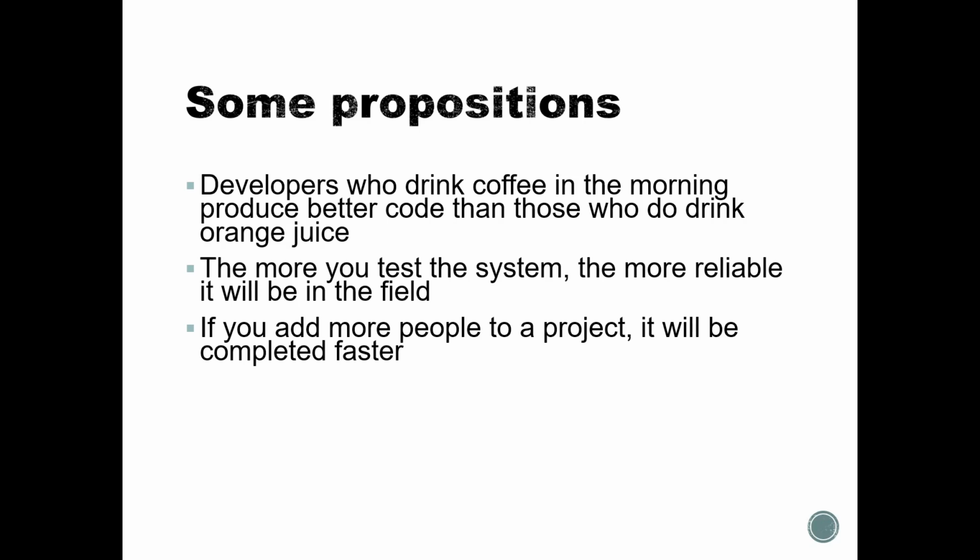Unfortunately, it will not always work. There's a rough estimate saying that you can halve the project time by throwing resources at the project, but you can't complete it any faster than half of the time, which is a sensible estimate. Meaning that if you have a 3-month project for one person, you can't throw 100 people into the project and expect it to be done tomorrow. No, of course it doesn't work that way.